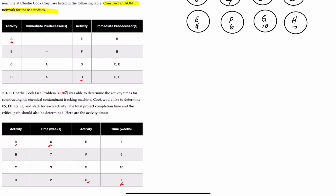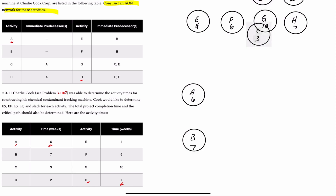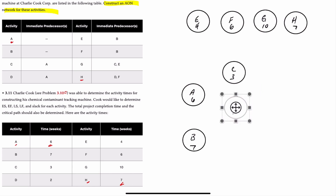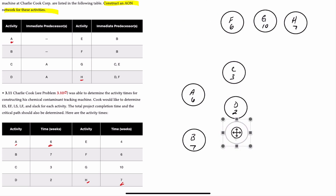Both A and B do not have any predecessors, so both of those are our beginning nodes. Activities C and D both succeed activity A, so we'll put activity C here and activity D here. Activities E and F are immediately preceded by B, so we'll place E and F accordingly.